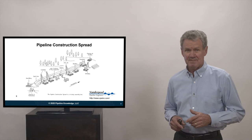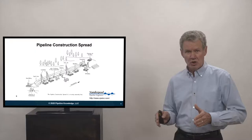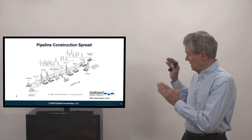This slide shows a pipeline construction spread. It was given to me by my good friend David Vanderpool of Vanderpool Pipeline Engineers. You can think of a pipeline construction spread as a moving assembly line. The materials are spread along the route and the equipment that fastens these materials together and puts them in the ground moves along the line.